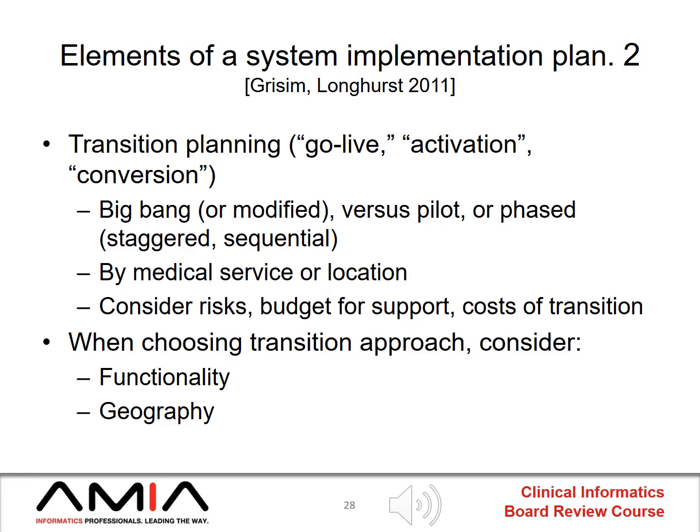This is also referred to as go live or activation or conversion. There are several extremes that you could consider. First is Big Bang, which is all at once. And then the other extreme would be you do it at a very small pilot and you phase it in. And you can do this with many variations. It could be staggered, meaning you start on one and you start on another but before you finish the first one, or sequential, meaning you start and finish in one side and then move on to the next, and so on.